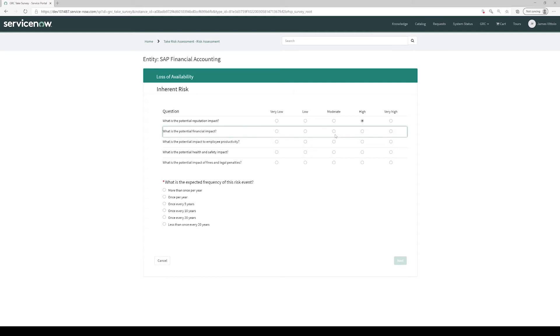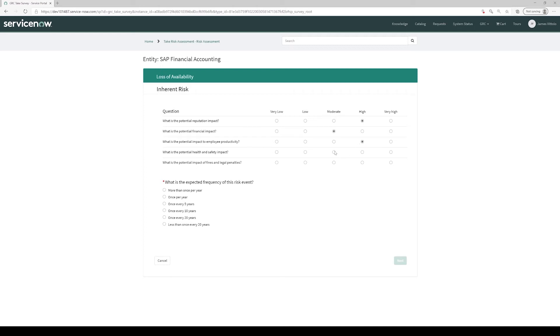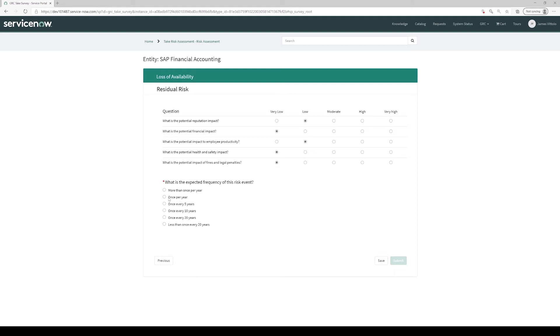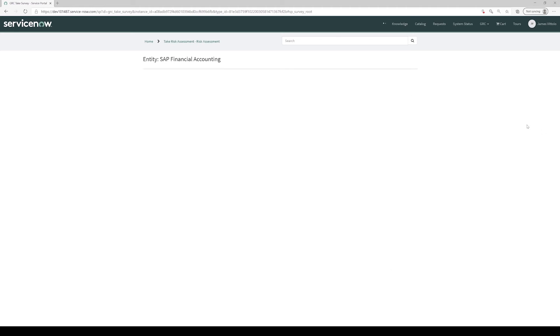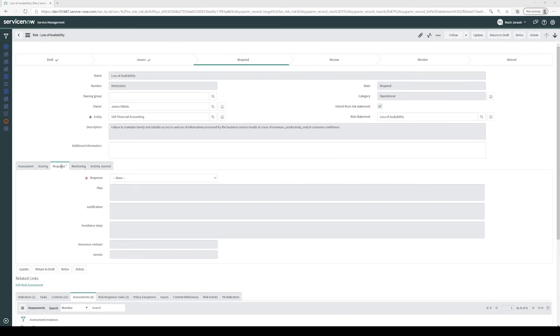As James completes the survey, he marks values on impact being higher and likelihood being more frequent because mitigating controls have not been implemented yet. After completing the inherent portion of the risk assessment, James completes the residual portion. He must consider how the mitigating controls the organization is going to put in place will lower the impact and likelihood of this risk occurring. After completing the survey, James clicks the Submit button.